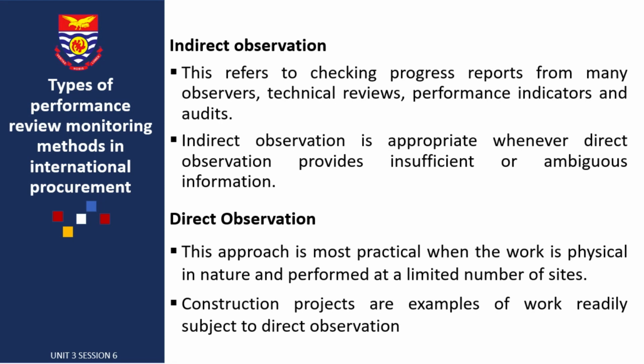But with indirect observation you get to mingle with the suppliers, use some form of technical reviews, or observe what they are doing to have indirect monitoring of the suppliers. The direct observation approach is most practical when work is physical in nature and performed at a limited number of sites.